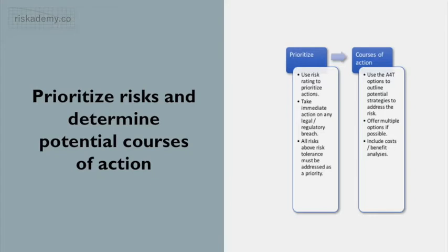Without consultation and consideration, the actions taken to address a risk may result in additional problems or be impractical to implement, so the owners of key risks and processes should be involved. This is not the same as the peer review of the final set of strategies, but there will be some natural overlap between these two activities. Another benefit of wide consultation is that you might find mitigation measures that address a range of issues.